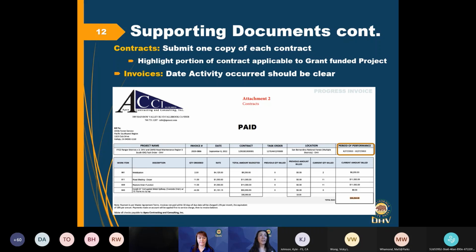For the contract invoices, we will pay you based on the contract invoices. Please don't include a total obligation cost, for instance, or total encumbrance cost, unless it is invoiced. We only want you to include the costs that are actually invoiced and processed for payment. That's really important.